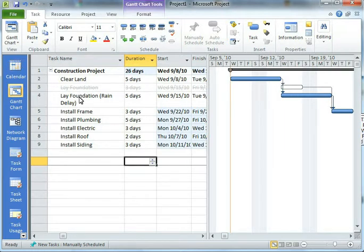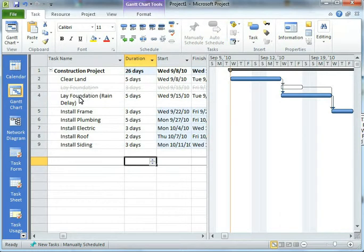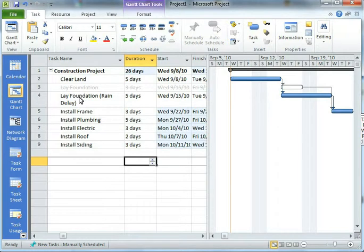A couple of footnotes here. First off, this feature is a Project 2010 only feature, which means if you've got Project 2007, the feature wasn't there. Also, if you're opening a Project 2007 project in Project 2010, the feature won't be there until you save the project as a 2010 project.